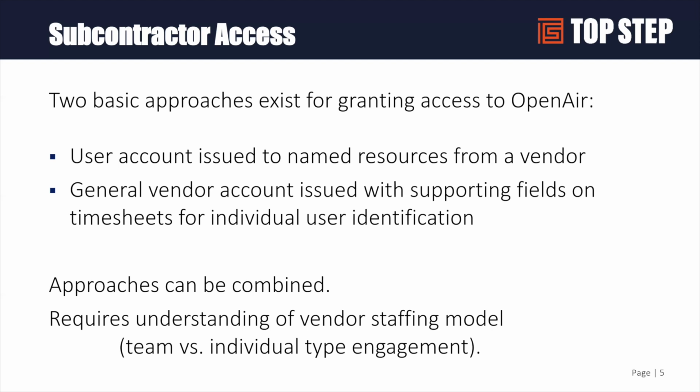With an individual approach, you're going to have much more visibility to be able to see hours and more transparency to who's working on which projects and doing what hours, versus a general vendor user, where you'll have less visibility as to the work they're doing. So you just have to balance which approach makes the most sense for your scenario.